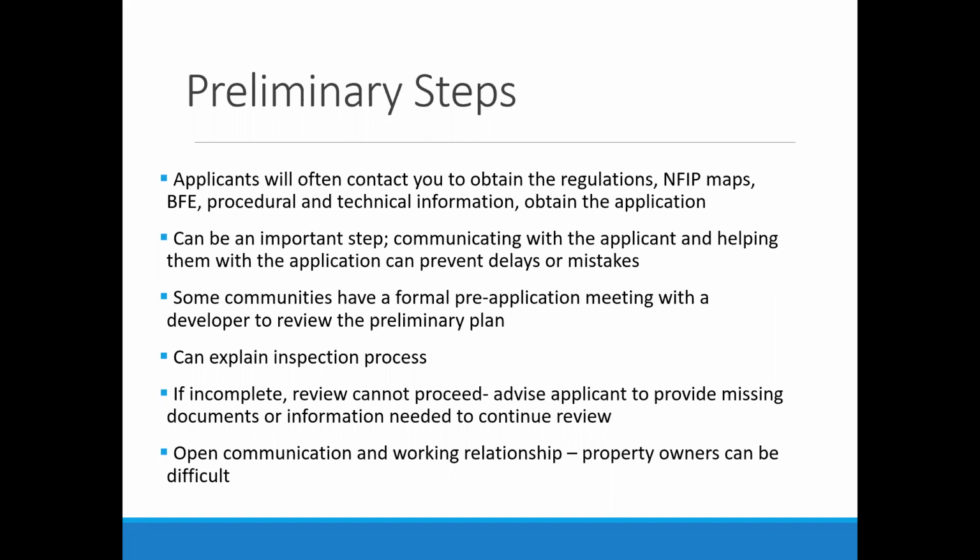Explain the inspection process, and then you are at this meeting so you can work out the schedule for that. When the foundation's going in, that might help streamline that process and let them know about the inspections. If they have missing information, they can provide it to you right then, or know that they need to provide it for you. And so this can just kind of streamline the entire permitting and inspection process. And so hopefully you can have an open communication and working relationship with them.